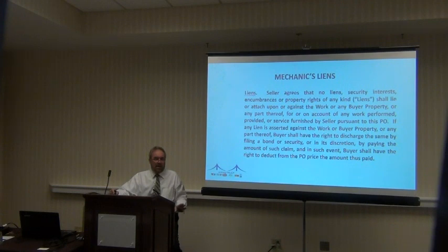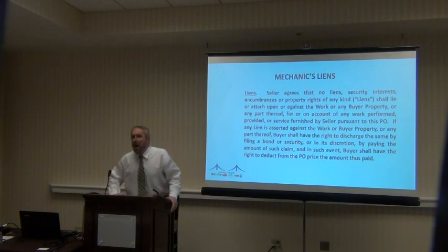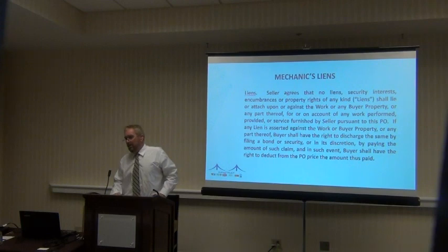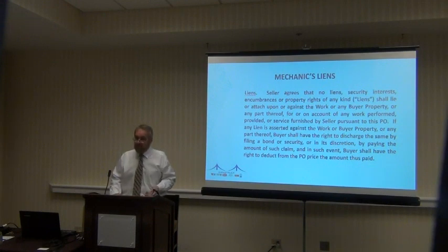If an owner tries to get a contractor, or if a contractor tries to get a sub to release all of their rights for everything at any and all times, no matter what happened or when it occurred, and they only pay them for that payout, their rights are only waived up to that dollar amount. So it's a pretty great provision in the law, as far as I'm concerned. A lot of people don't know that, and they don't know how to work that. That's a great provision of a lot of benefit to contractors and subs and suppliers in the state of Kansas.